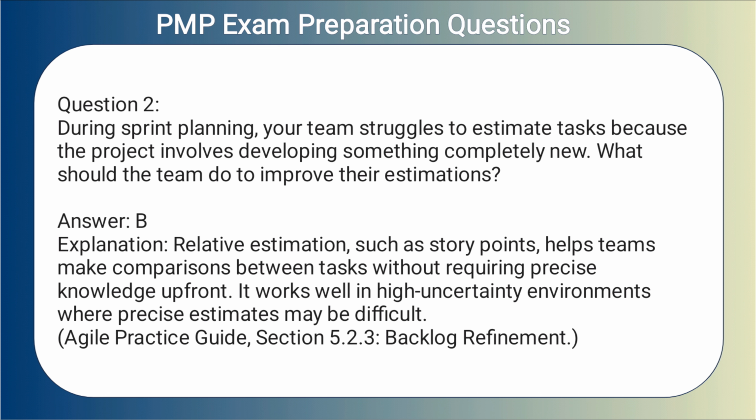Answer: B. Explanation. Relative estimation, such as story points, helps teams make comparisons between tasks without requiring precise knowledge upfront. It works well in high uncertainty environments where precise estimates may be difficult.